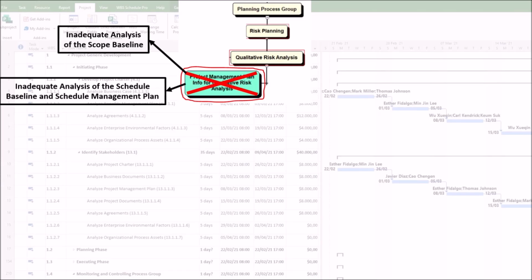If the schedule is not analyzed for critical paths, dependencies, and float, you cannot accurately judge the impact of a delay. A 2-week delay on a non-critical task is low impact. The same delay on a critical task is high impact. Missing this context leads to misprioritized risks.